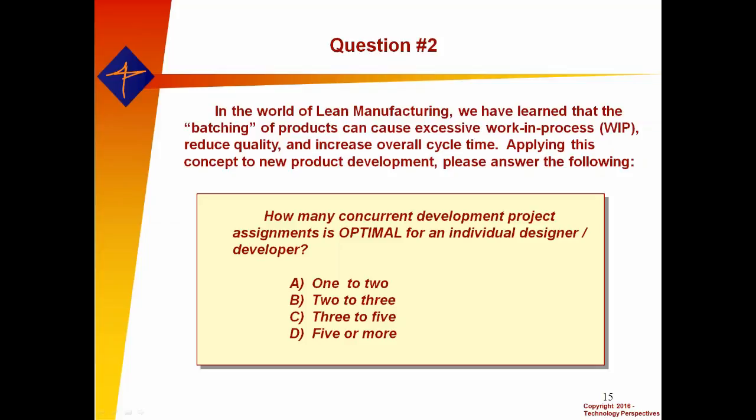And of course we have to do some of that. I mean, we have to be realistic here. A dedicated team is not optimal. In fact, it turns out in my time studies that people who are working in dedicated team format actually had a lot of stand time. They had a lot of slack time. And there wasn't a great deal that they could do during that waiting period for materials or information or whatever. So if they had a backup project or even a second backup project, they could be moving those projects along effectively. As long as the priorities are clear, 2 to 3 actually turns out to be sort of the optimal